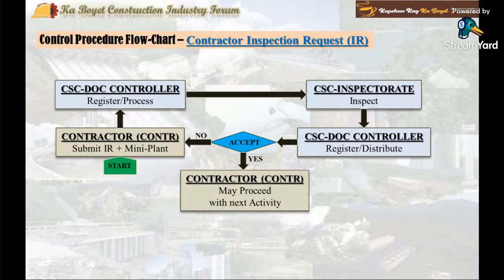Note, for any repeated failure of inspection which adversely affects the progress of work, consultant shall notify the contractor QA/QC manager or the contractor project manager or project in charge of the project for necessary corrective action or to conduct evaluation and or improvement training.